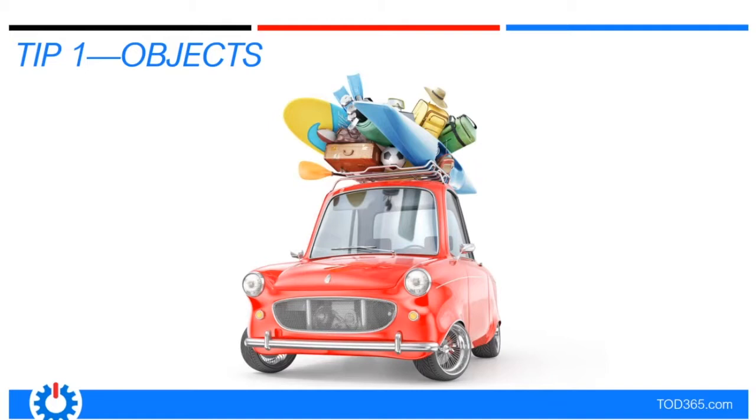We've seen a lot of quotes where people say, you have this many forms, this many custom reports, this many custom integrations, and here's an average amount of time for each of these types of objects, so here's your quote. That is a 100% recipe for disaster. You have to be able to drill into the actual objects themselves to investigate the nature, or level of sophistication or complexity. Without that ability, you are not going to get a true quote. So, key takeaway: it's all about the objects, but not just about the numbers. You've got to understand the nature.